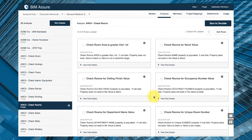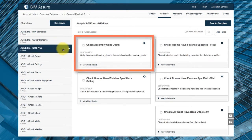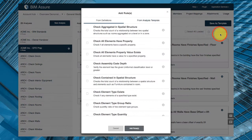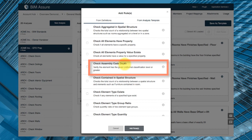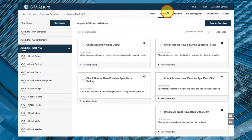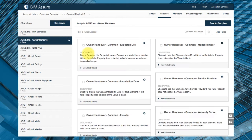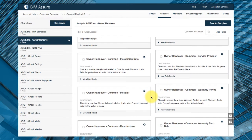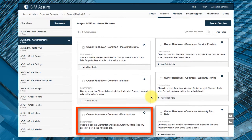During estimating you might want to see if assembly codes are accurate to support reliable quantity takeoff. And at handover you can make sure all building equipment is named properly and check that product manufacturers and model numbers are specified.